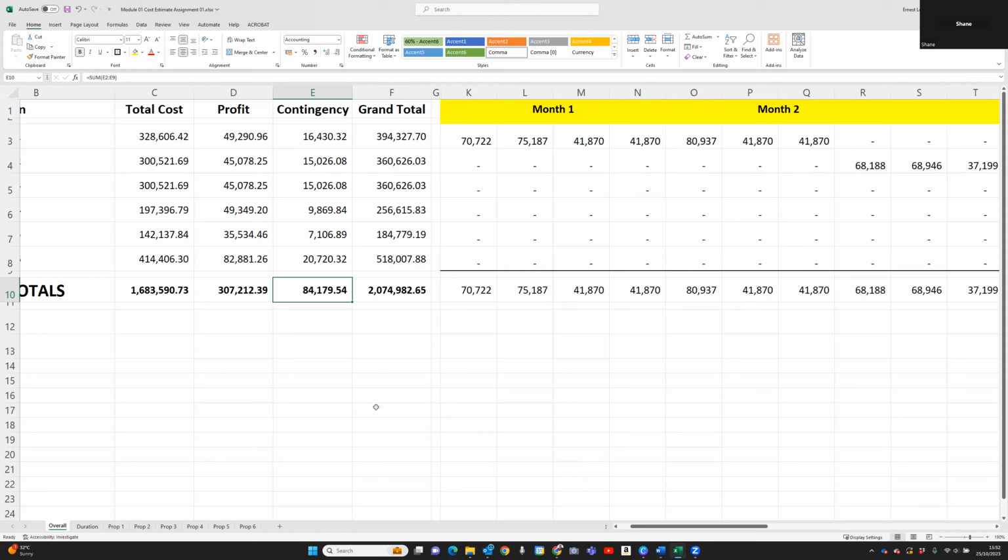If you obviously don't use it, then you've done your estimate well, and then you can use that to mitigate any unforeseen risks that come up. That money is not there to build a fancy gate or add an extra little pylon onto your walls or whatever the case might be. Just remember, if you're doing an estimate for a project, that money normally belongs to the client, okay? And they normally use that money to build all the other additional goodies that they can.